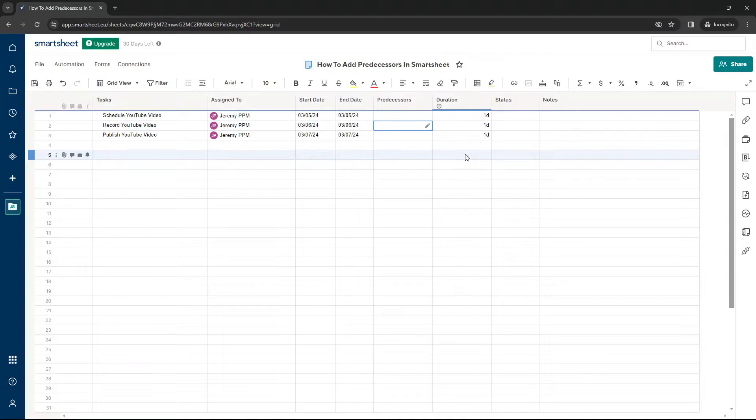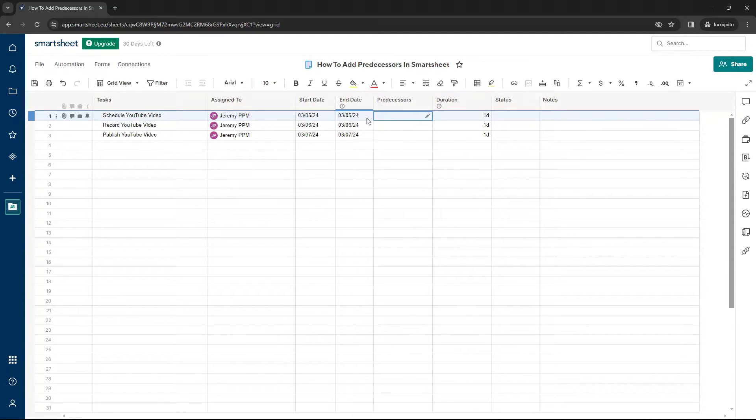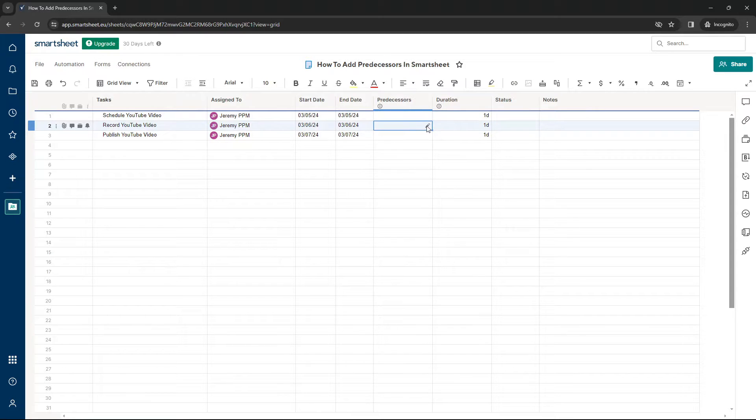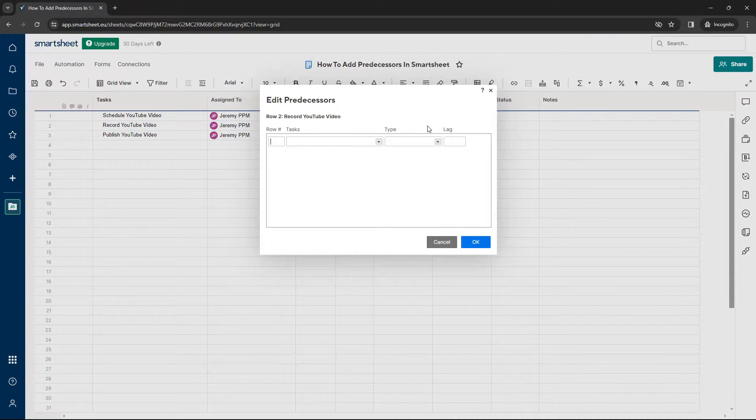So now we need to set up our predecessors. So all you need to do, and I'm going to set up this particular row doesn't require a predecessor because it's the first task in the project. But this row does. We can't record until we're scheduled. So what we're going to do here is click this little pencil icon.